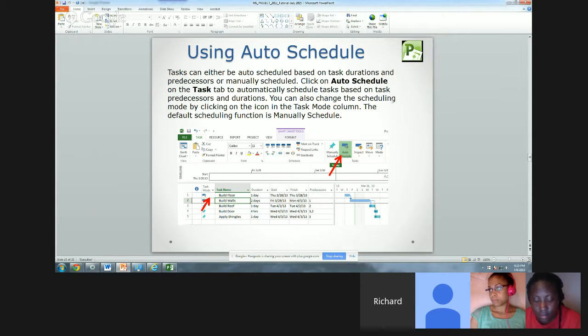So really, your start date usually defaults to the current date. So for your LRE and really for your team project, you don't want to figure out your start and finish dates and key them in there, because that's the easiest way to run into problems. So click on auto schedule and have it be automatically scheduled. For the most part, that's going to be the way that you do it. Like I said, if your project's delayed 6 months, then you want to change your start date and have all the other dates follow suit.